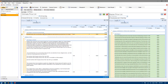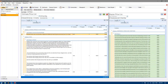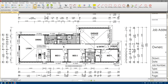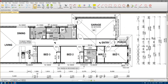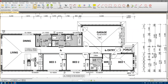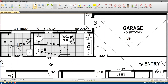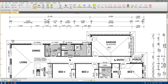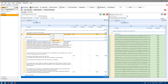Mark complete. Now, provide shower with no hob and or step down to bathroom and ensuite as per plan. That's our standard construction method for slab-on-ground homes — to drop the wet areas and then bed them back up. And if we zoom in, we can see there's no hob on that shower and there's no hob on that one. And there's only two showers, so we're good to go.